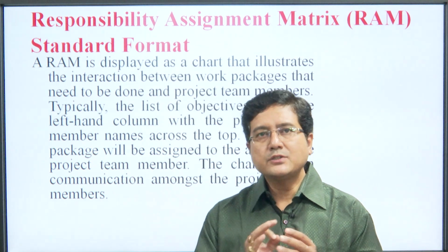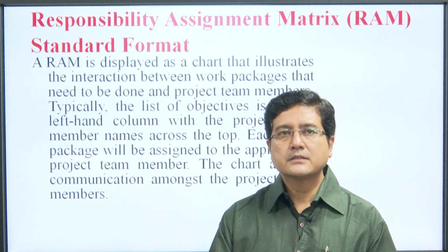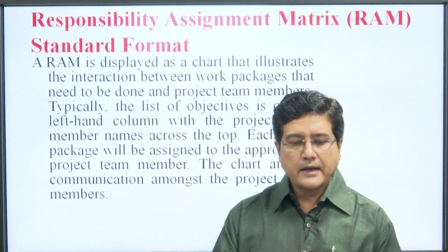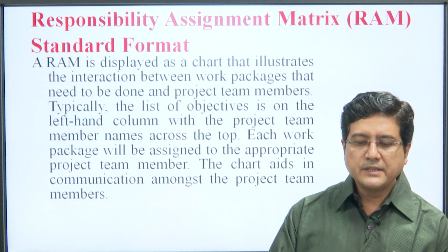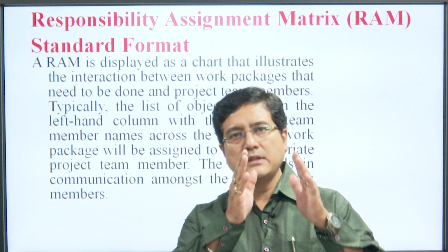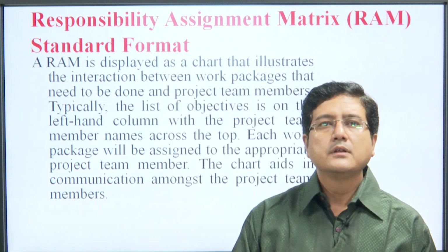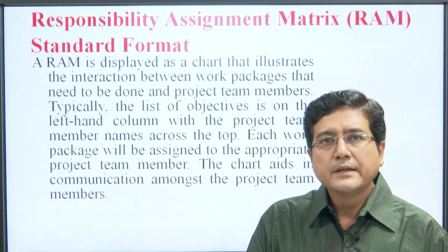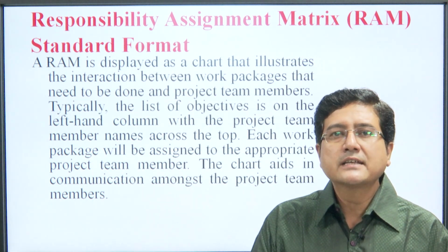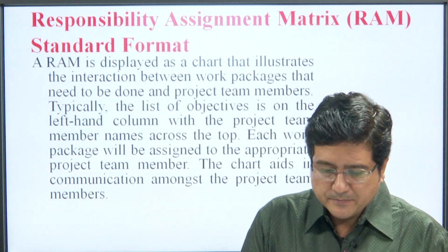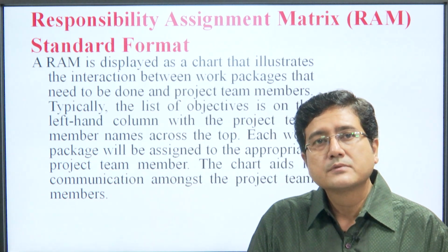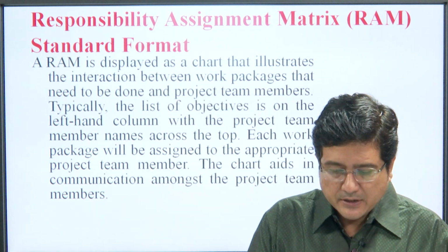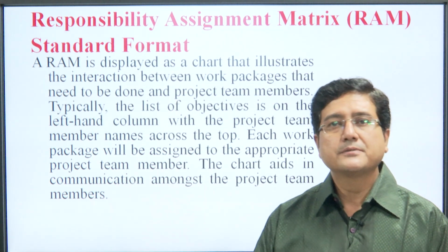Typically, the list of objectives is on the left hand side, the left column, with the project team member names across the top. Each work package will be assigned to appropriate team members. The chart aids in the communication among the project team members.